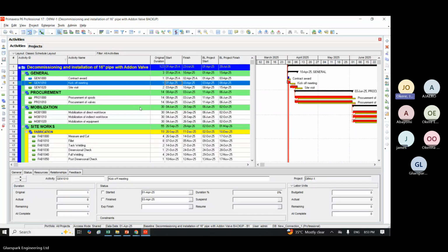Try your best and be joining early. If you join early, we covered this in our last 2 weeks Thursday, when somebody asked this question. We differentiate between the green and red, and we said the critical part are on green. All these ones I have here, the critical part are on red. All these ones are critical activity. And we also explain the meaning, that if we delay any of these activities on red, we are not going to finish this project the day we have planned to finish it.